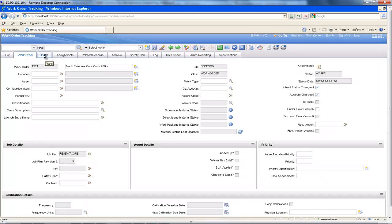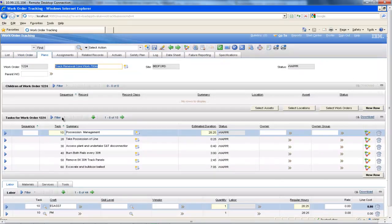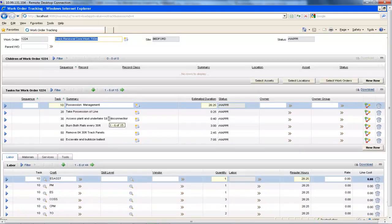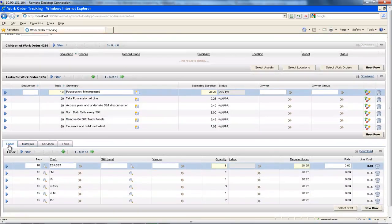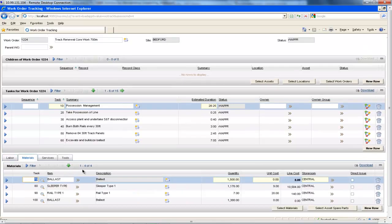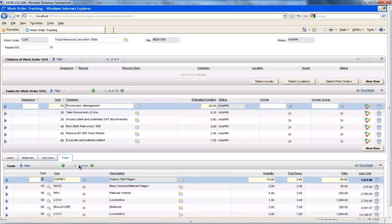If we now go to the plans tab, we can see the details of the 15 tasks that need to be carried out to complete this work order. In addition to the tasks, the plans tab also shows details of all of the labour, materials, services and tool requirements corresponding to each task. So here we can see that this work order has 44 labour requirements, 4 material requirements and 21 tool requirements.